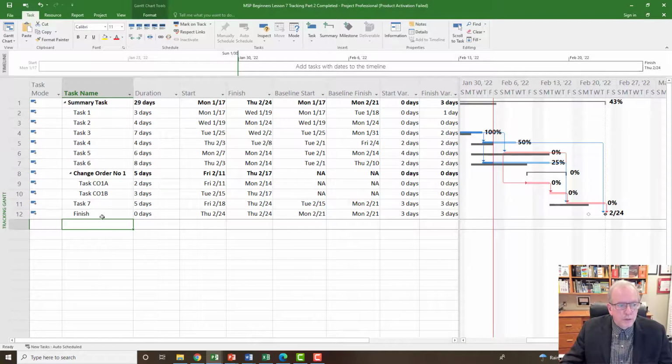And that's why you want to be able to insert a change to see that impact. Maybe a contemplated change. You haven't got it signed off yet, and you're thinking about it, and you want to see what the impacts are. You might want to look at that. Maybe that means that, well, if we do this, the client really still wants to finish on time, so that means we'd have to work several weekends. Can we do that? What's the cost implication of that? How's that affect the cost of the change? Give the client some choices. What is it that they're after? How do you know? There are projects where nobody really cares that much, and that's fine. But then there's projects where they do care.